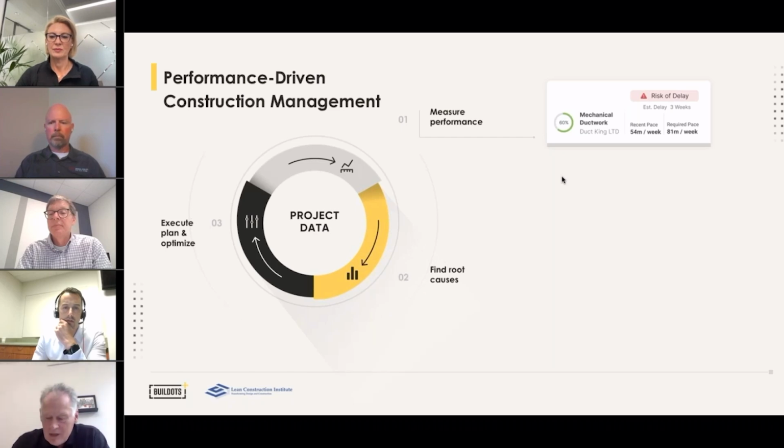Inefficiencies come back to some of the metrics you've been talking about: how much of the building that's available to be built are we typically using and working on. From all of the studies of the projects we were working on, it was about 46%. That means there's 54% of available workplaces that we're not working on. All the construction people out there will be saying, yeah, but there are reasons why. Of course there are, but it's unearthing what those reasons are and which ones we can manage and do something about using all the lean principles. So that was a starting point.